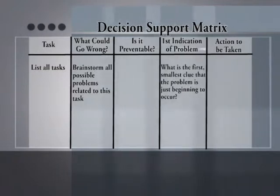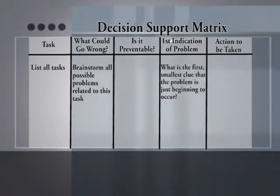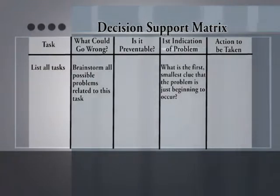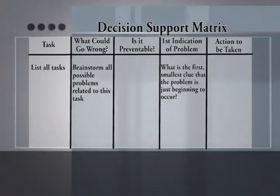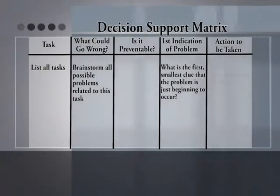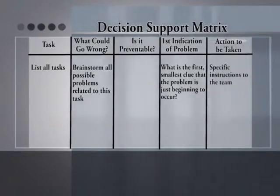Once we've identified all the possible problems, we want to find the first indication of the problem — the first, smallest clue of the very beginnings of that problem. So when I see this indicator, it tells me this problem is just starting to happen, and here's what I'm going to do about it. We then give specific instructions to the team on what they need to do.